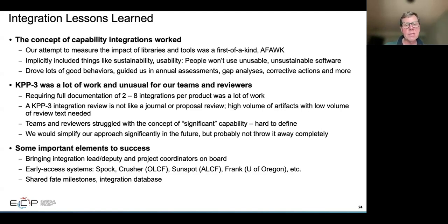Some of the important elements to success with the integration activities: we brought in an integration lead and deputy as part of the project, and we also have project coordinators for each of the products. So this is a person who is familiar with the process that ECP was imposing on teams and could, in a sense, be the expert. PIs were not always the best people at process. They were focused on developing new algorithms, developing capabilities, and process is somewhat orthogonal to that. So bringing in and populating expertise across the organization was an important success element.